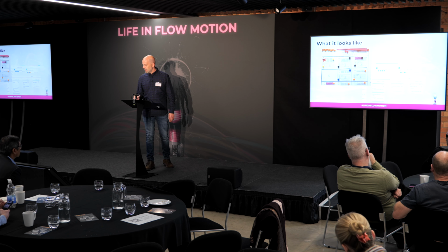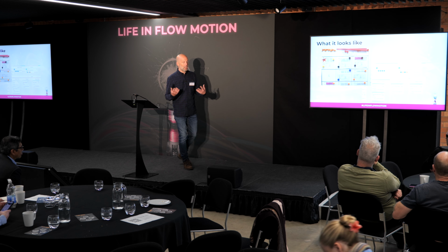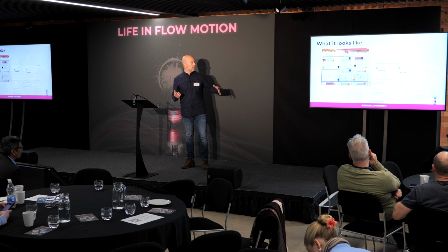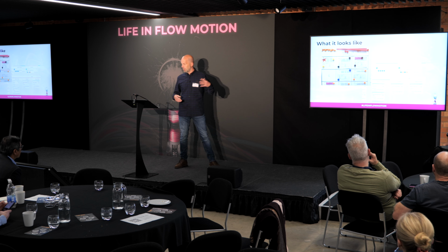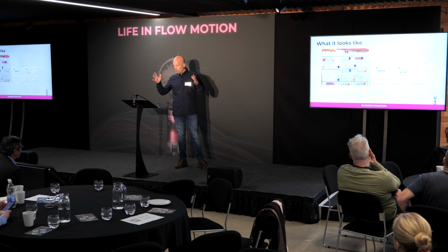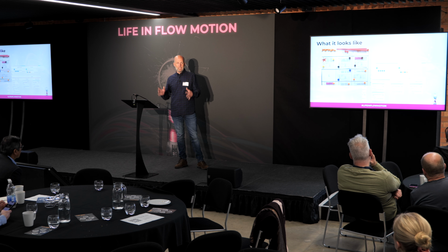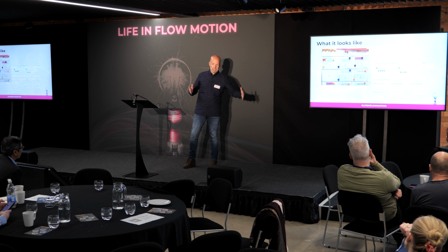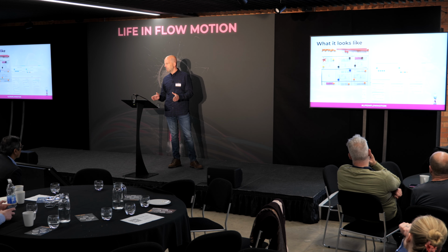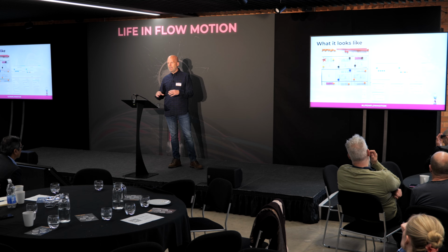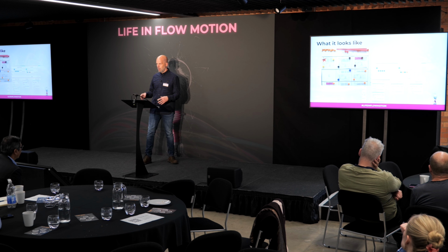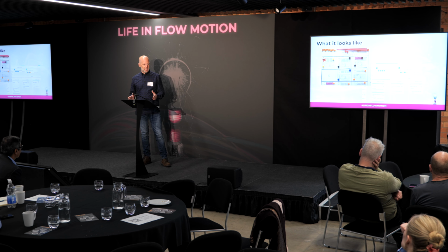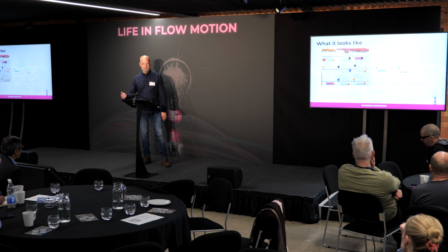So what does it look like? Simply, we started off with a paper system of work packages and tasks, like on the previous slide. And then, having a very, very well-defined process, that's when we started to look for digital solutions. So I work now with Business Map. Business Map perfectly matched the process that we defined. And I think for any digitization anyone attempts to do, always define your process. If you have to do it on paper first, do it on paper, and then look for a digital solution.